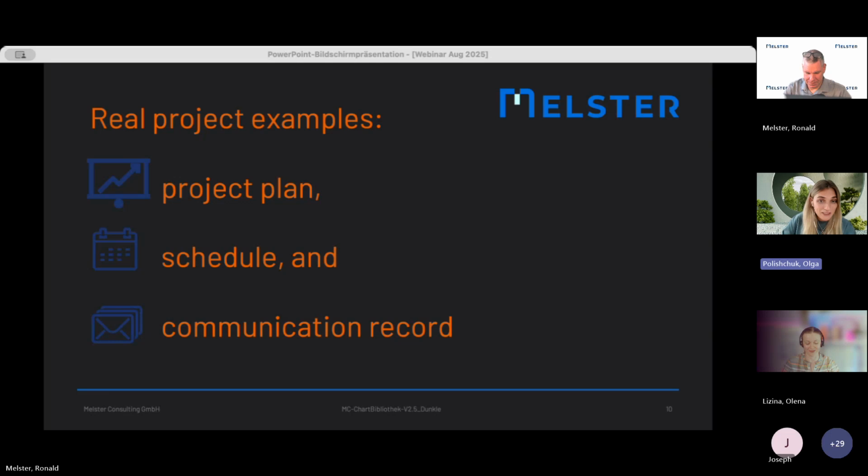So, Ron, is that what you expected, or does your experience tell a different story? Coming back to my statement, there is no information item called project plan. However, Automotive SPICE requires a lot of information, like, for example, the scope of work, the work package or work packages, the escalation path, and stakeholder groups list. I'm quoting exactly from the PAM 4.0, just to name a few. And what these information items have in common, all of them can be stored collectively in one document, or they can be distributed amongst several documents. That's up to you. And where should we record these information items, scope of work, escalation paths, etc.?